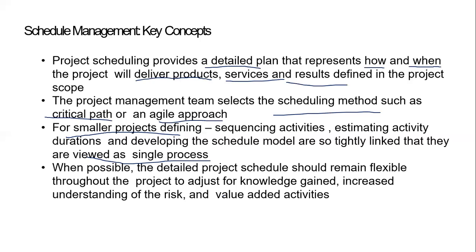It's a complex system we are working in. So what do we need to do in scheduling? The schedule has to remain flexible. There has to be some wiggle room in a project plan, in the schedule, so that a few things can be adjusted, like knowledge transfer and knowledge gain. Initially you may not have too much idea about the tools, technologies, and client processes. It might take some time, but eventually you will catch up. That needs to be understood.